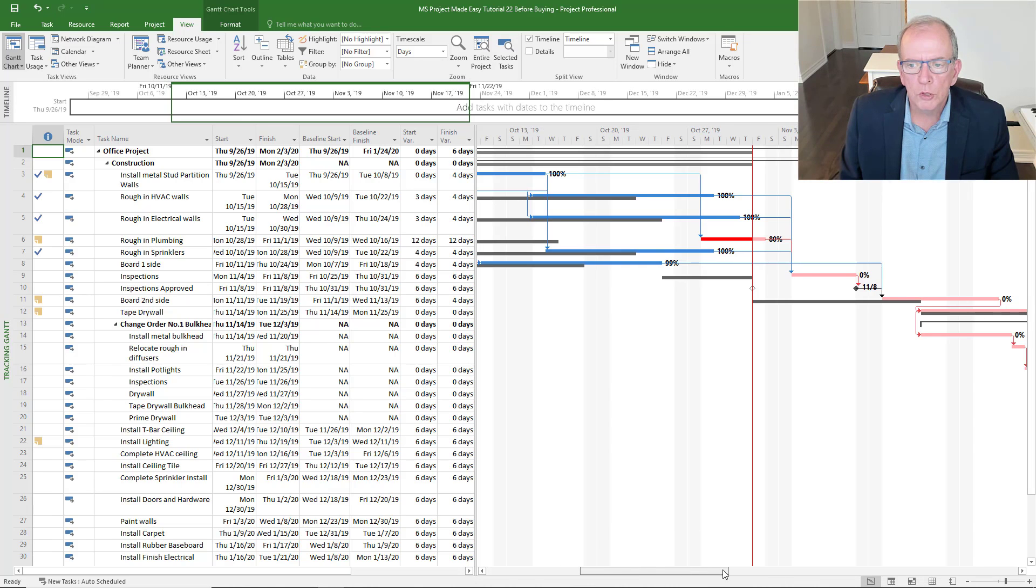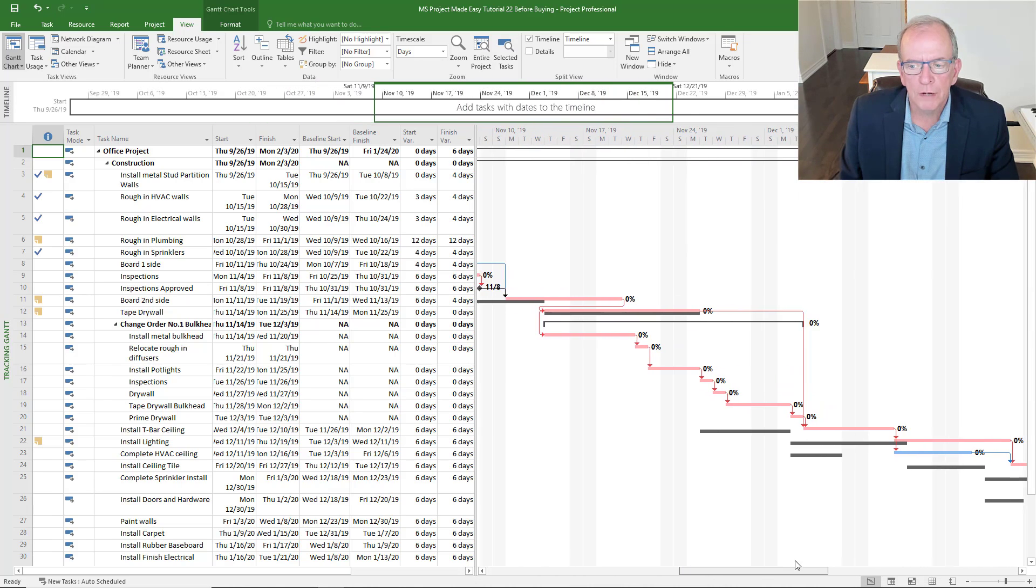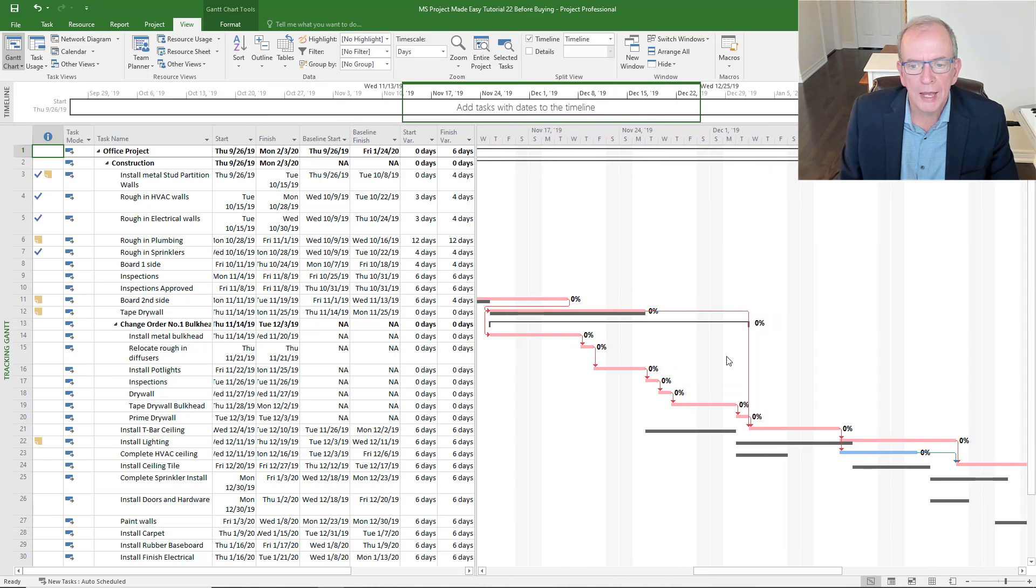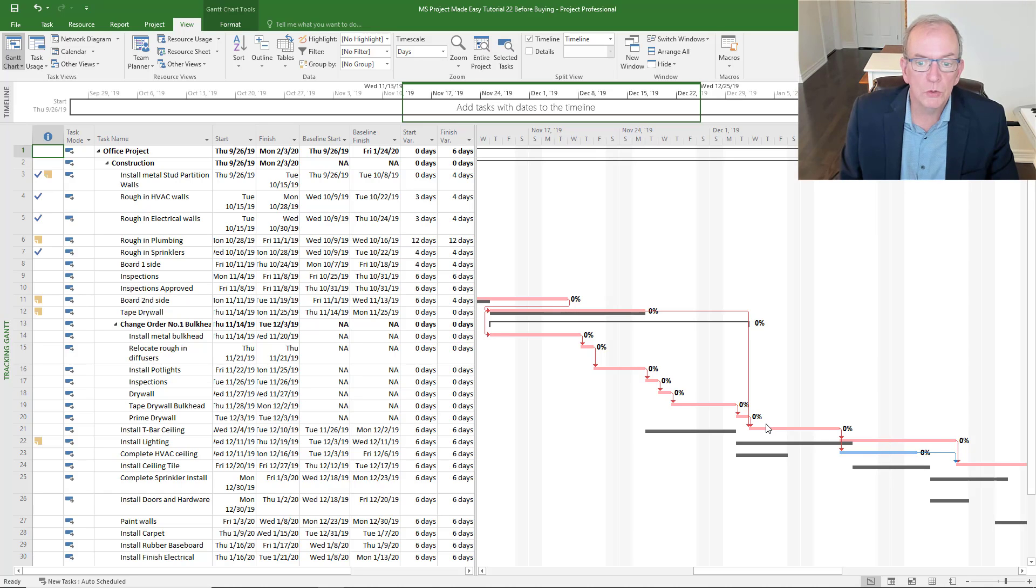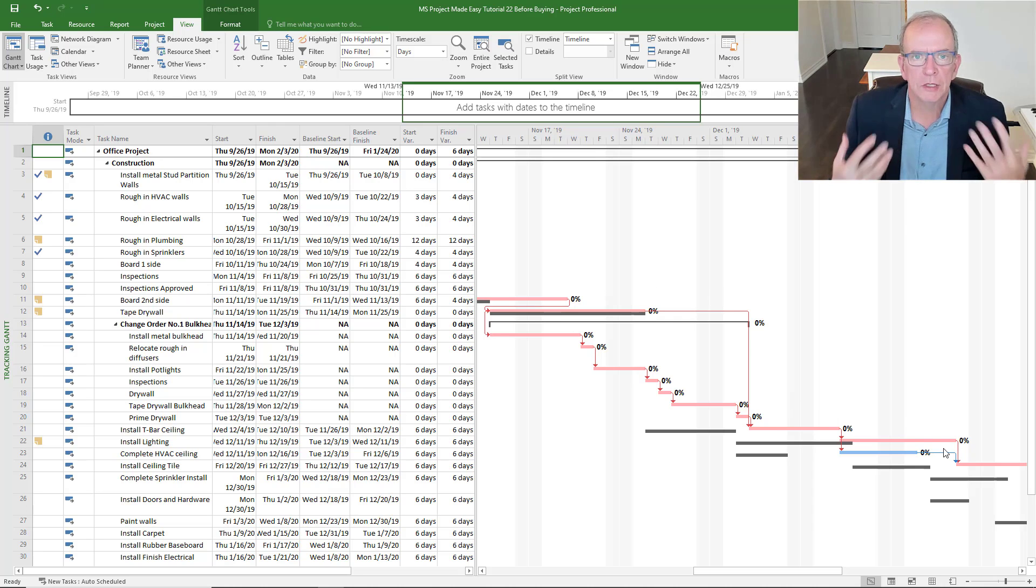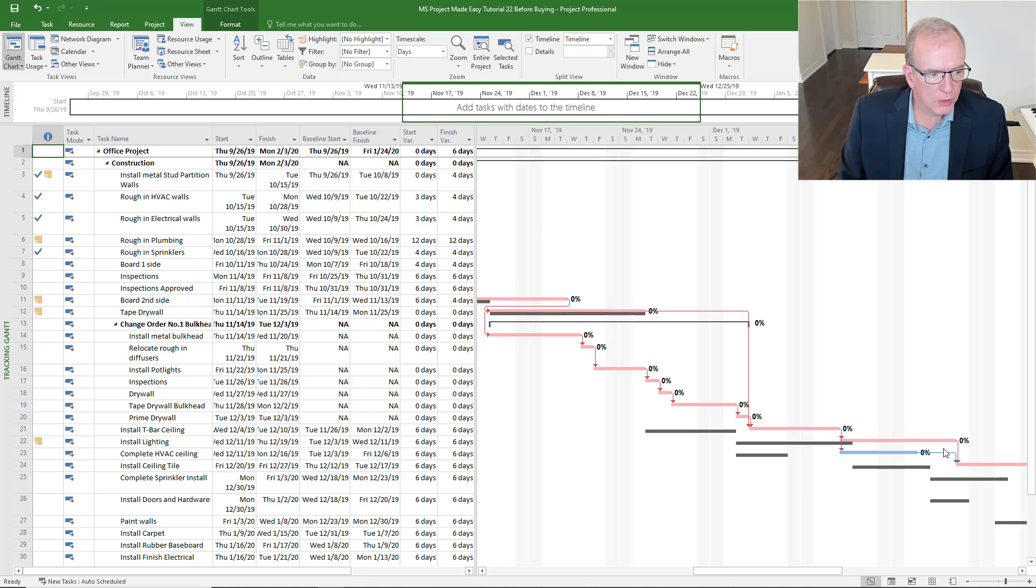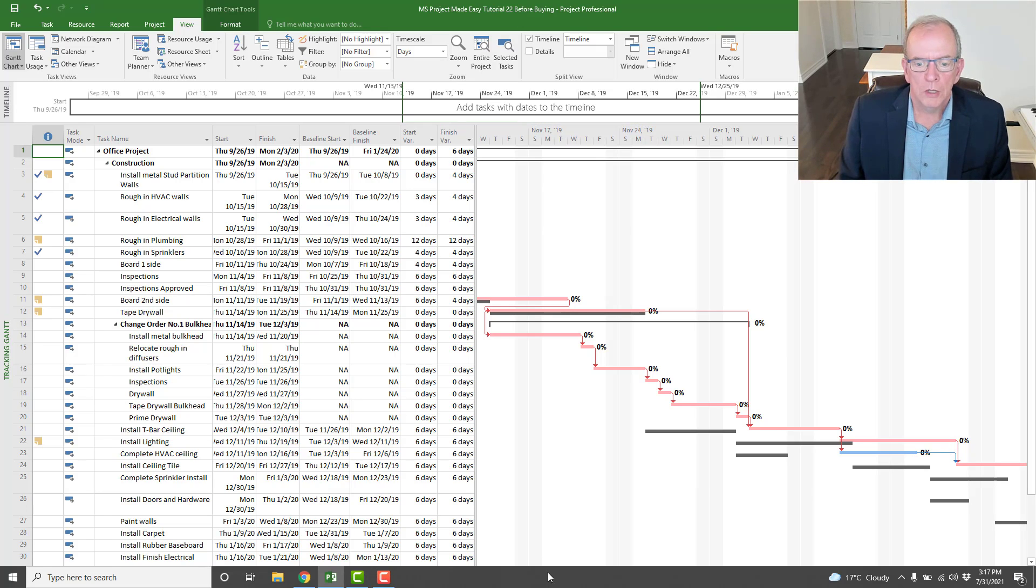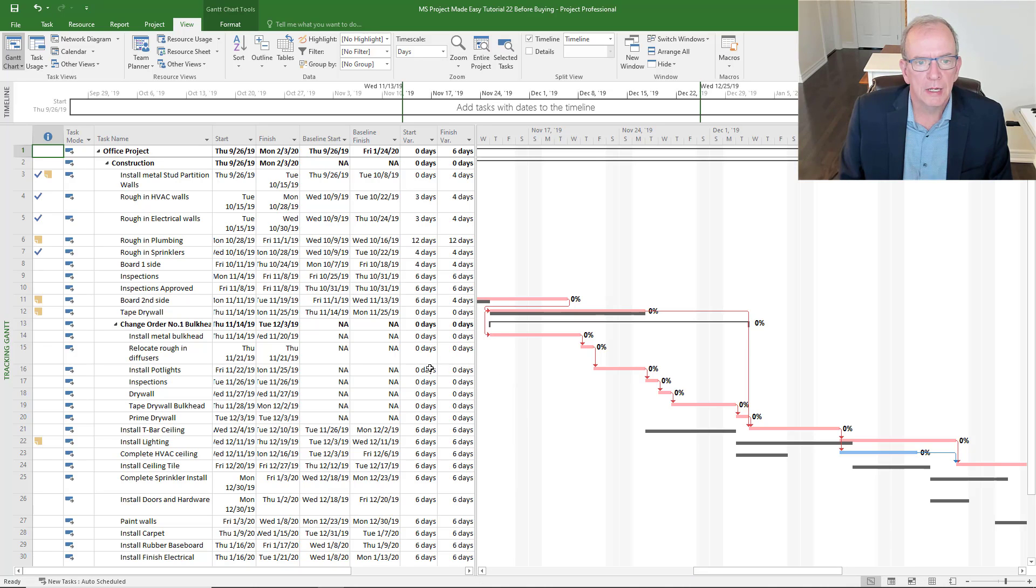Then you can start saying, well, how do we recover that time? How do we get that time back? It gives you some good ideas to look at. First off, you're just going to look at critical items because shortening blue items is not going to get you any time back. Critical items will get you time back. So it gives you what you need to focus on and gives you a good process to follow. It's a really excellent tool in that respect.